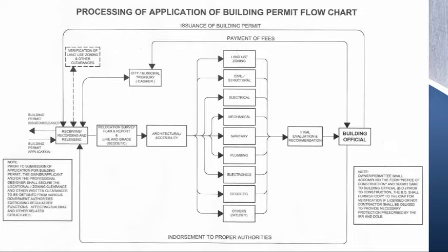And this part is very important. Sabi nga sa land use zoning, in this part, we will know if the project that is to be constructed is suitable and compatible for the land that will be used. Because, for example, ang project is bahay and ang nakuhang land is in the classification of grasslands or pasture. So, hindi siya compatible para sa residential houses or residential home. And because of that, kailangan mag-apply for other clearances from other agencies.